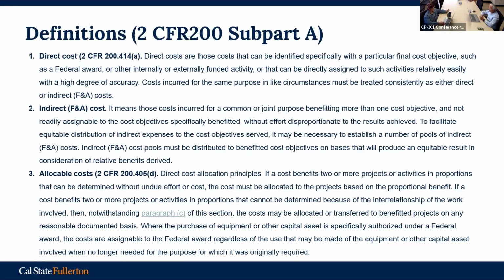Now, we already discussed direct cost. The direct cost is something that delivers the process. And so you capture, you track an electrician, who went to this department, who went to the other department, in what project. So you start tracking those costs, okay? Normally, physical plant management has a job order system.